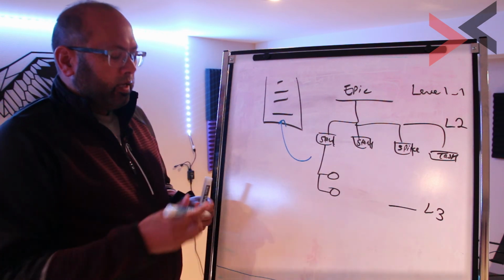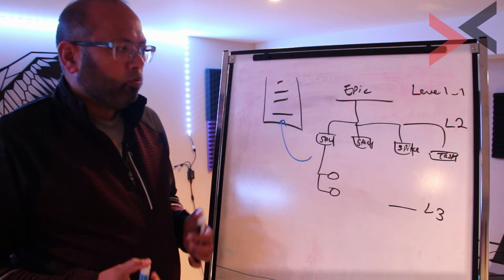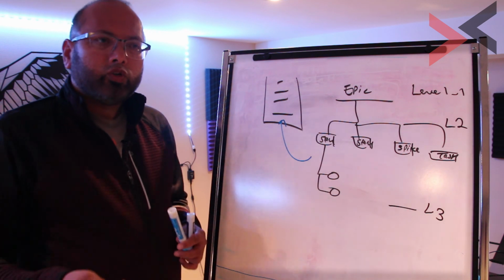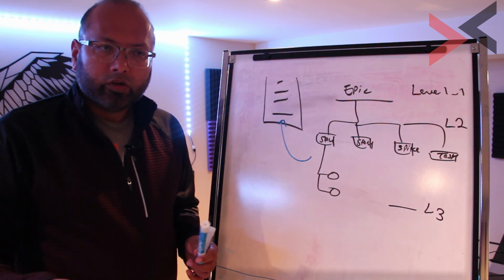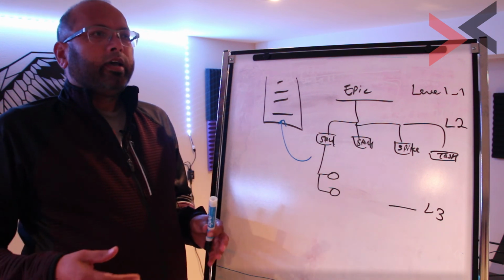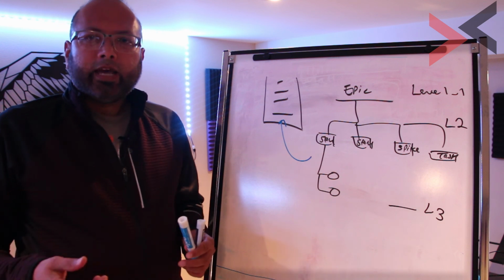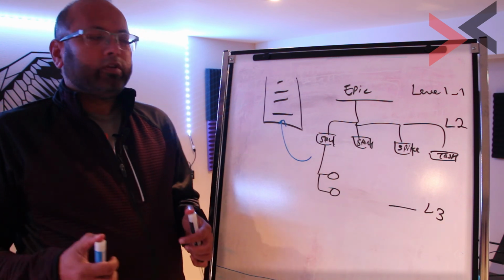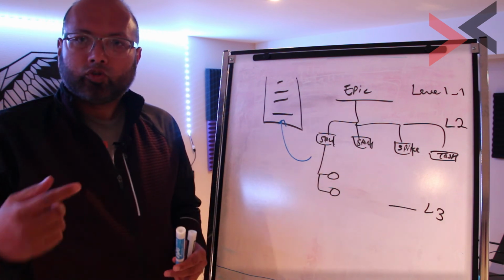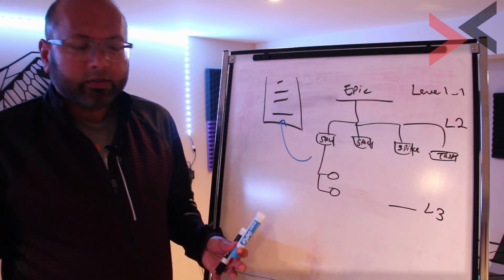Just to give you an idea, what is a spike? You might be asked as a Scrum Master, hey, what's a spike? Why do you need a spike? You're going to say, well, if you don't know what you would need to do for a particular function, for a particular tool, you're going to say, let's create a spike. A spike is like exploration, discovery, go and find out. And from there, you're going to come back and say, oh, I've decided we're going to do this, this, this. From that, you're going to create a story or multiple stories. You may even create a document or process, whatever.